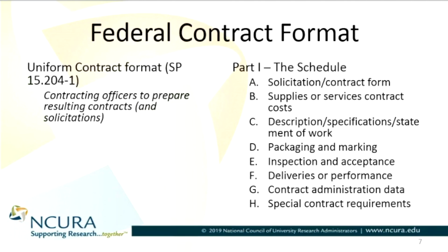So seeing the federal contract format, this often shows up in the RFP or in the statement of work building at the proposal stage, and it doesn't always wait until the award stage. So I think this is a really great thing to keep in mind: if I start to see these items line up as part of the proposal package, there may be a contract that's coming out of this, and I need to think about this differently, and I need to work with the faculty to make this go through in a much better manner with a lot more details, and I need to call my contract and grant central office because there may need to be some negotiations.